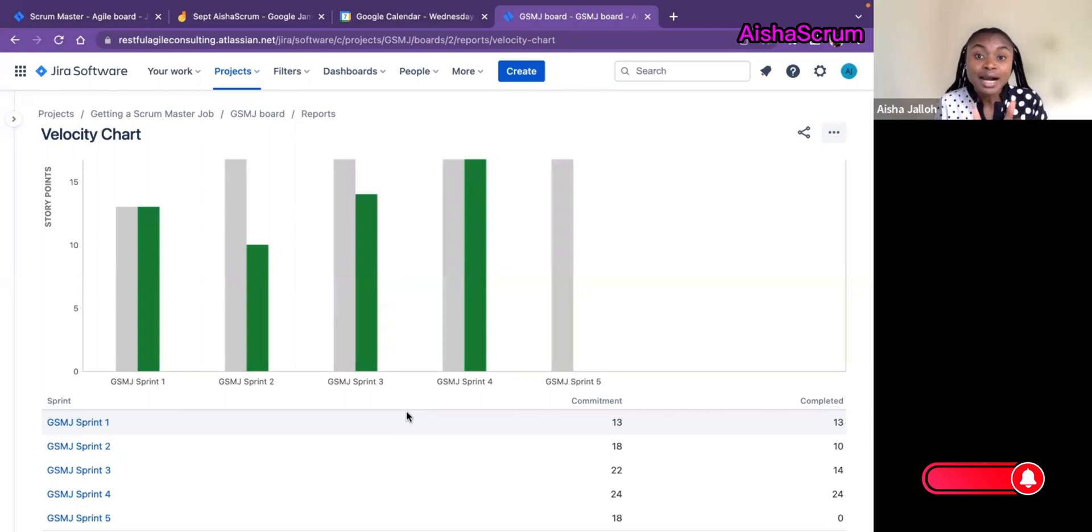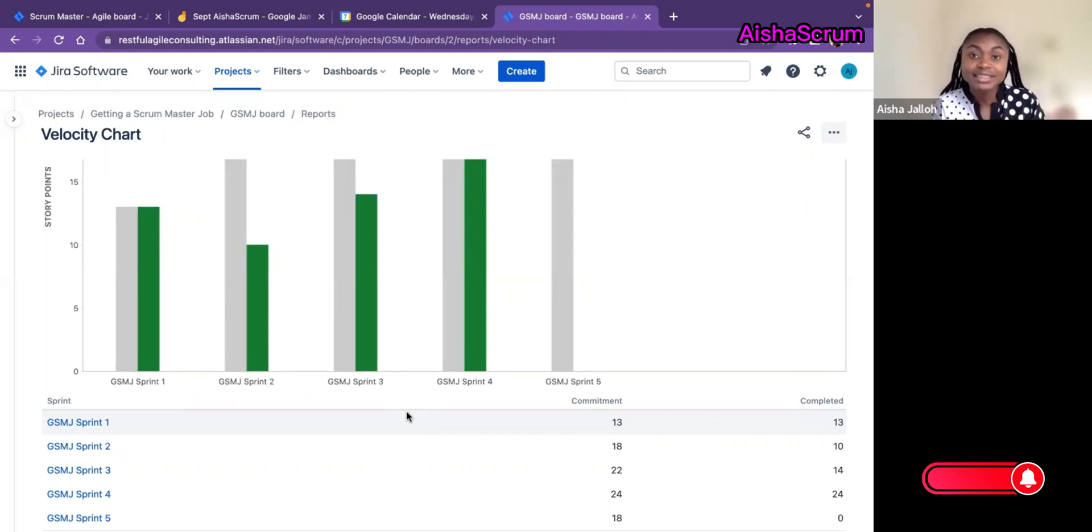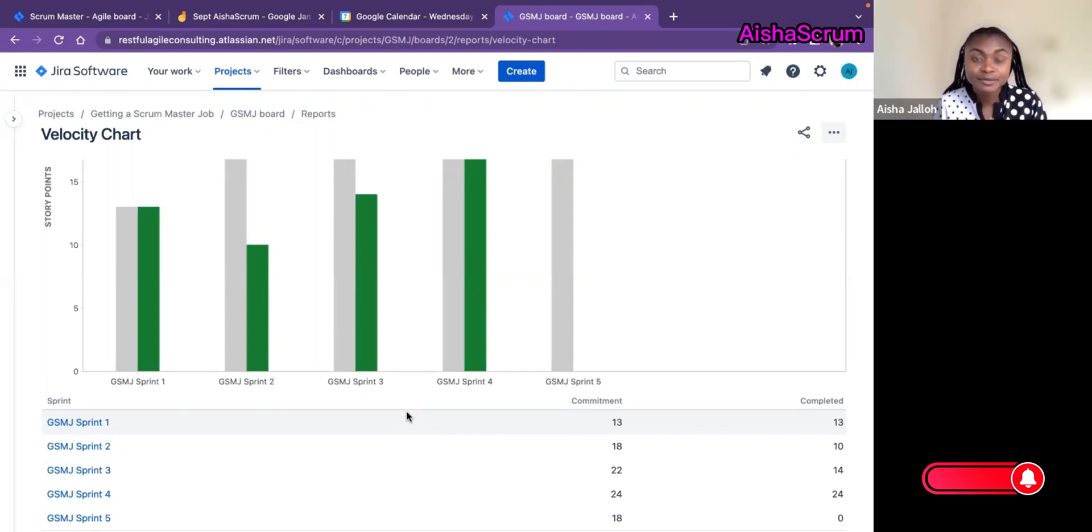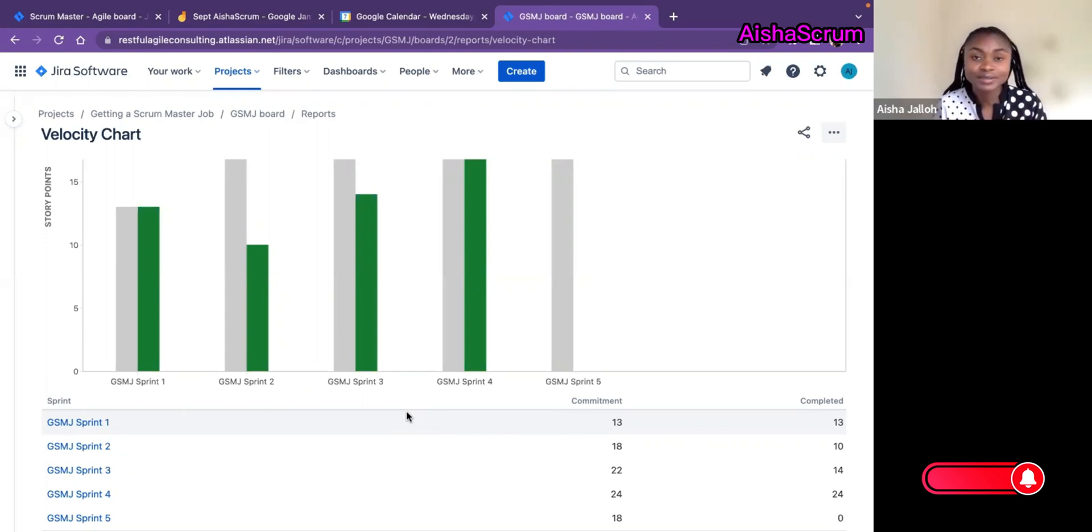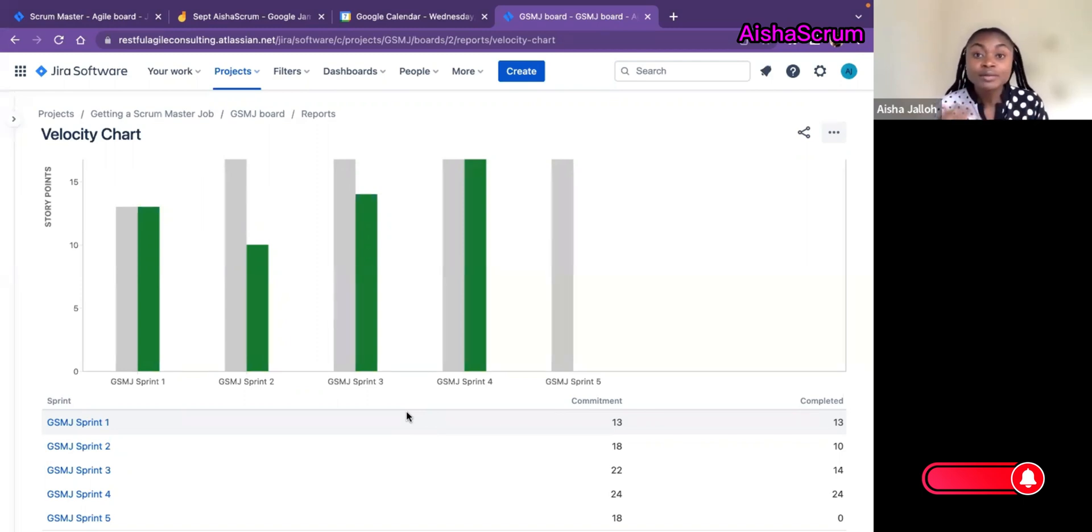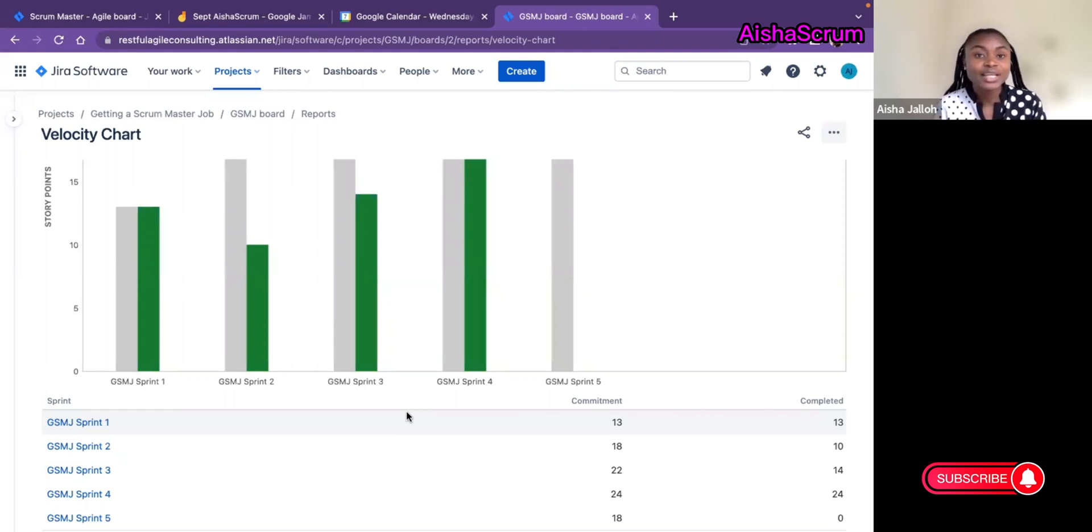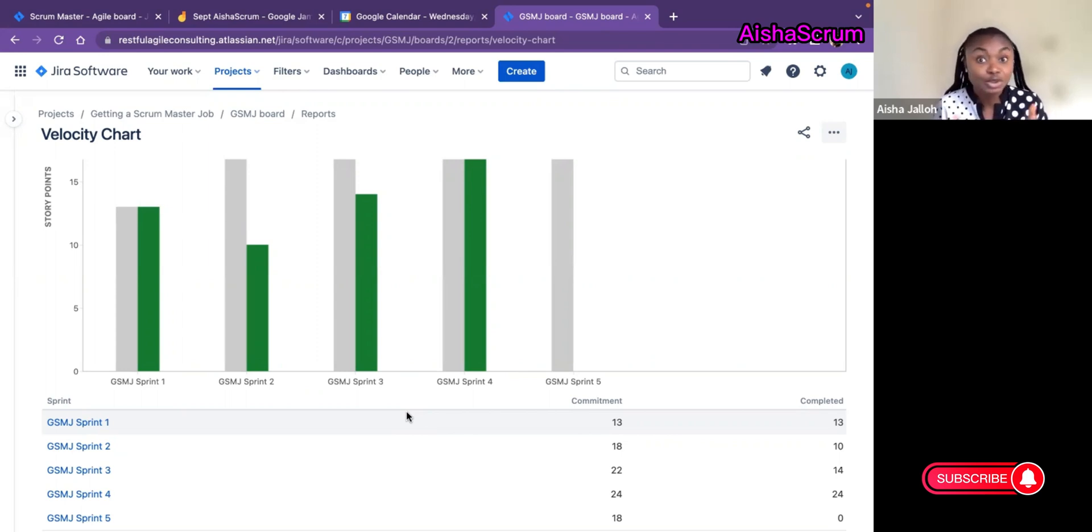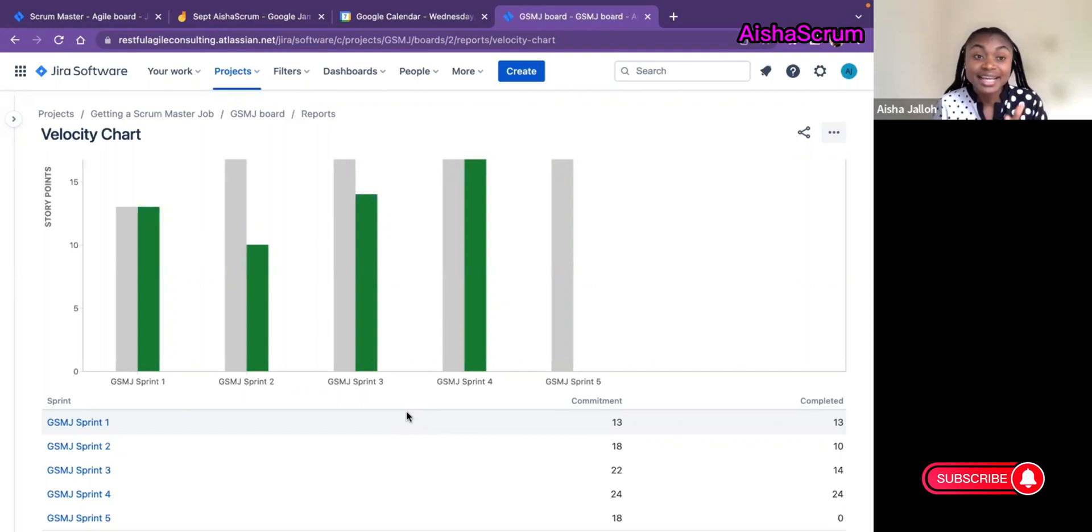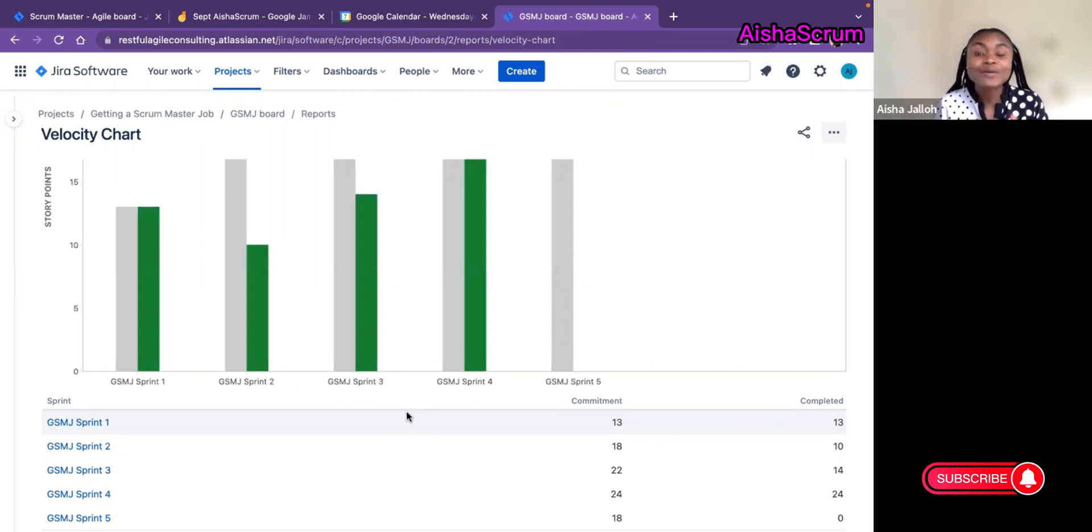Velocity is based on the effort, the complexity involved in actually doing this work. We measure all of these by story points. In story points, the team will come together during sprint planning, during backlog refinements, and they'll estimate each user story. That number will now be attached to the user story. Then at the end we can commit something. Sometimes you hear people say velocity is capacity, and it's true. The best capacity to assess for velocity is basing the team's true way of committing to work, which is our velocity.